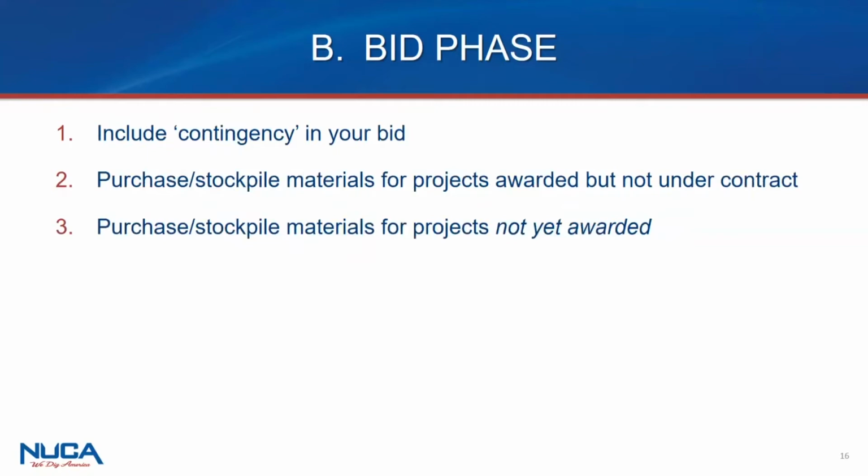Shifting from the pre-bid to the bid phase. The first one is something that, I say you can include a contingency in your bid. Of course, the real world is, it's not so effective, because if you're including a contingency bid, chances are not everybody else is going to, so you're not going to be low. So while you can do that,